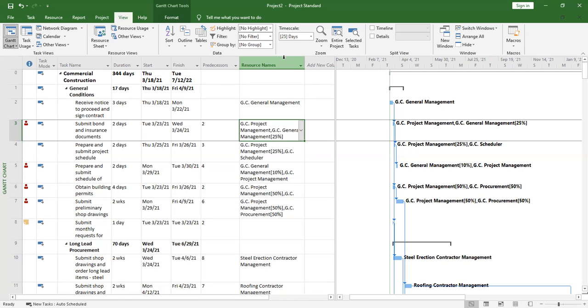By optimum utilization, we mean there is no underutilization of resources and no overexertion of resources. Underutilization happens if you assign a number of resources onto a single task. For example, a task is required to be done in one day, but you've assigned more than 5 resources onto it. That means you are wasting resources and money, and also underutilizing those resources.